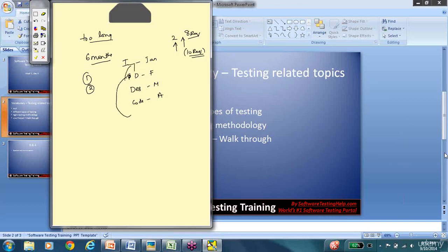That's number one. And as Tina said, the client comes only in the beginning and the end. If we are looking at an average of 6 months, only in month 1 will the client be involved, in the month of January. Again, come June when the deployment is happening, or slightly before, that's when the client comes back. If in these 5 or 6 months significant changes have happened to the business, and those have to be reflected in the product that you're building, which in effect represents your business itself, that kind of input from the client is completely ignored in the waterfall model.